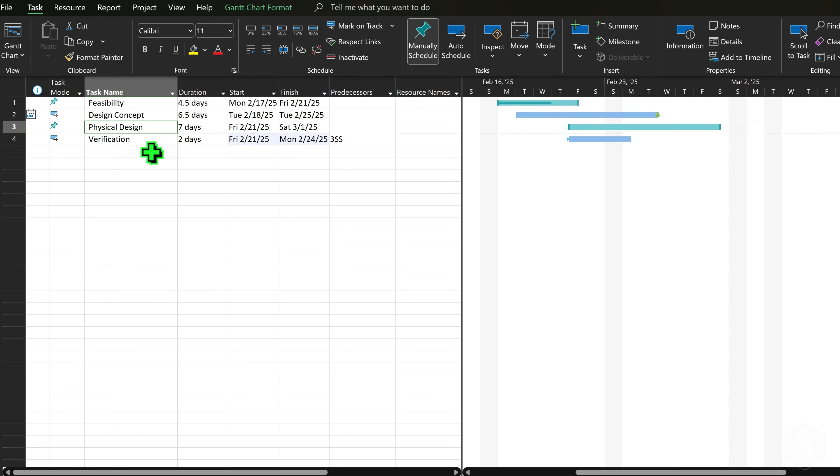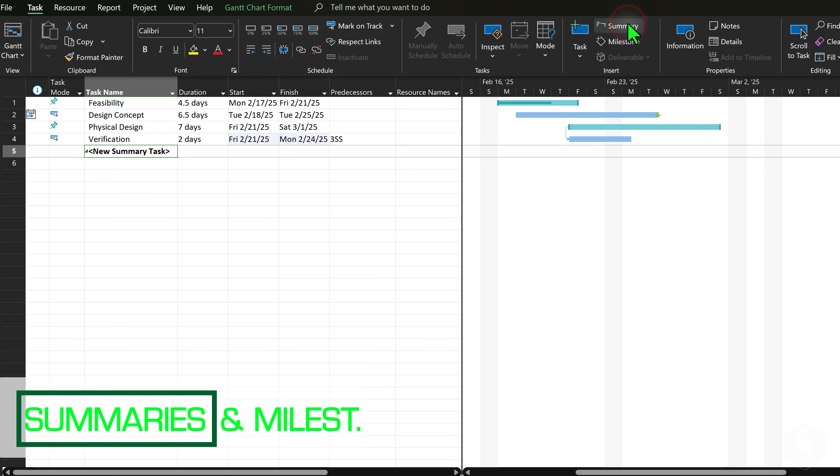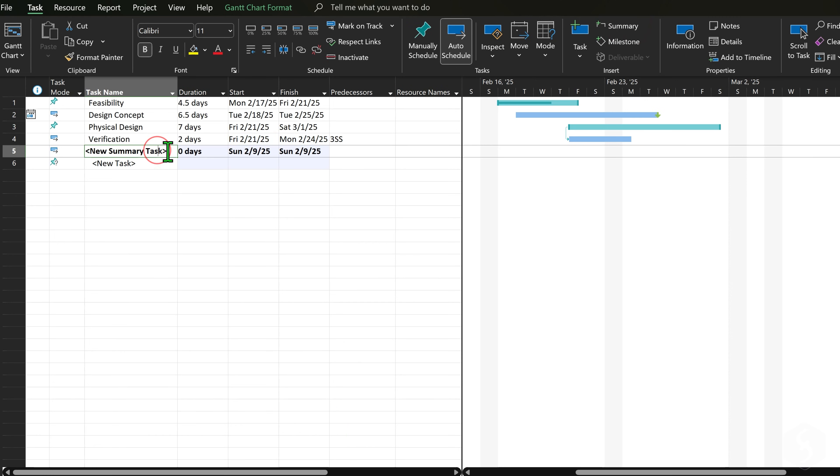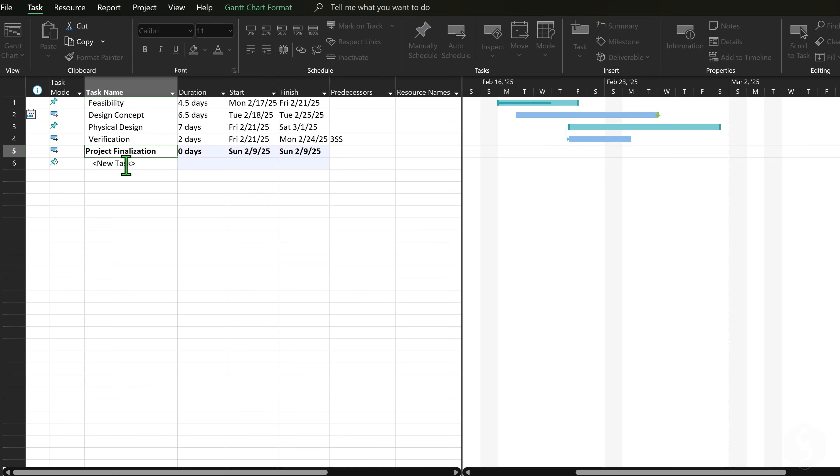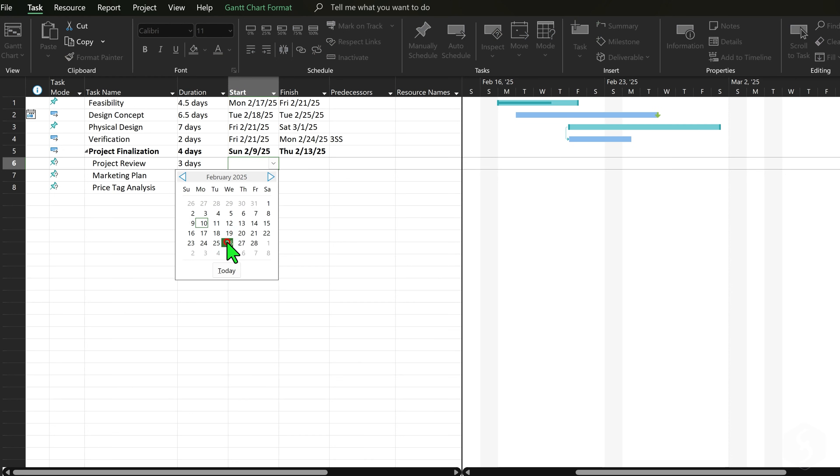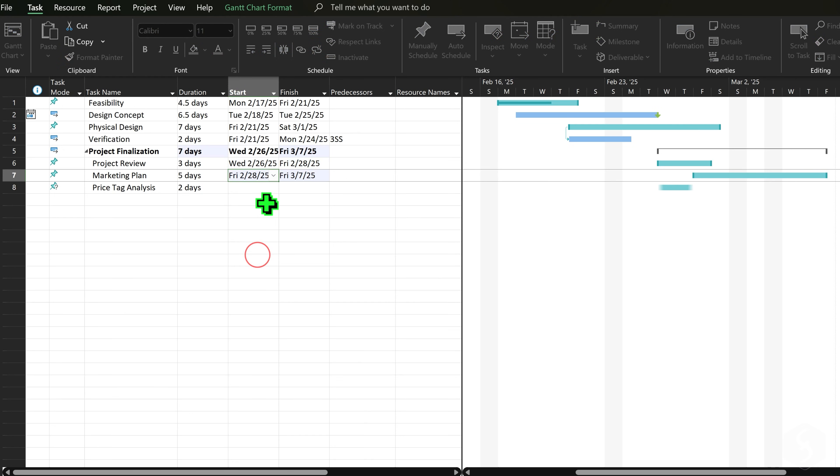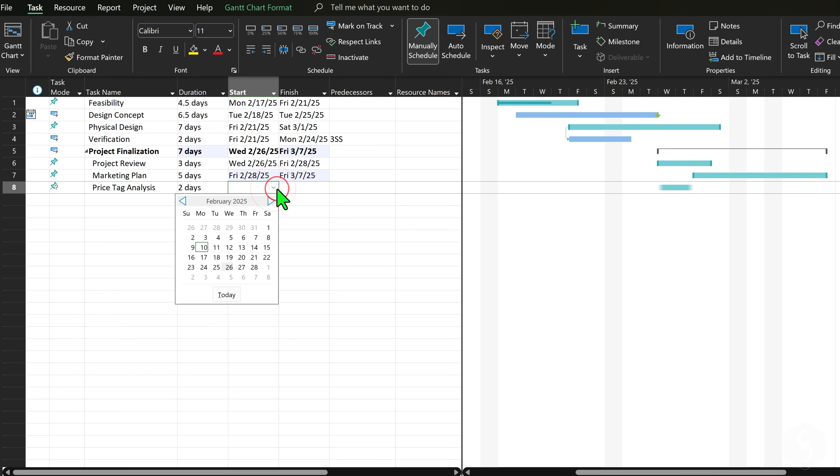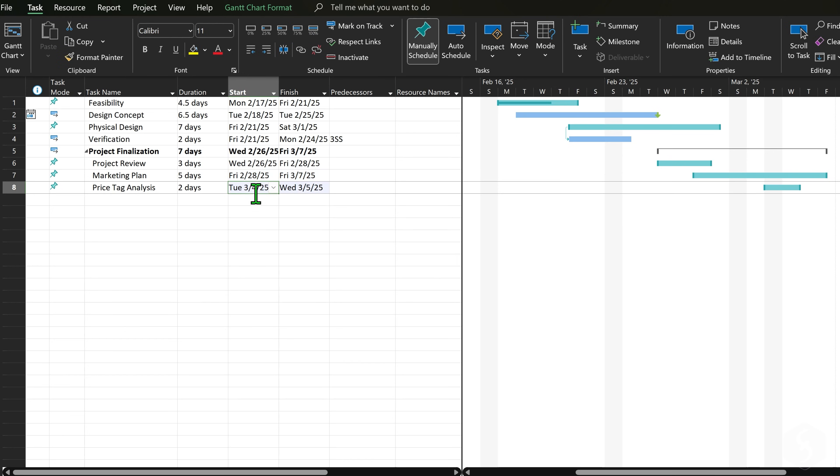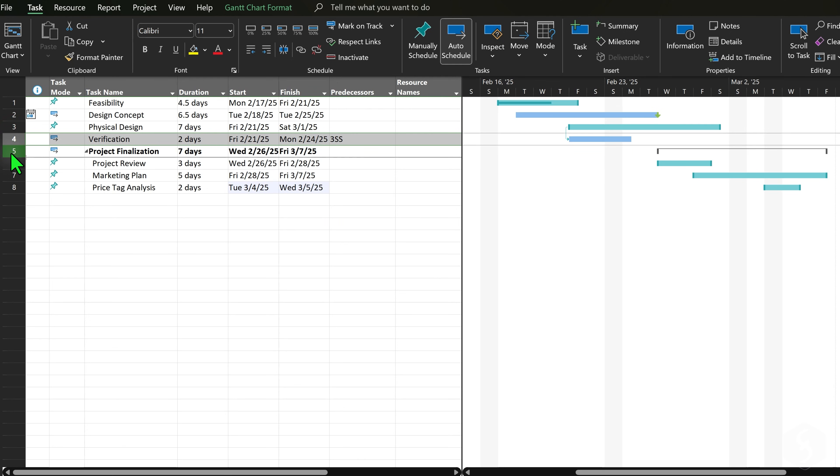Select any task row and go to Task Insert to add a summary, such as a group of tasks managed as a single one. This appears as a bold entry in the Task Sheet where you can set name, task mode and all the related tasks within it. You can also import existing ones by selecting entire rows and dragging these within the summary.